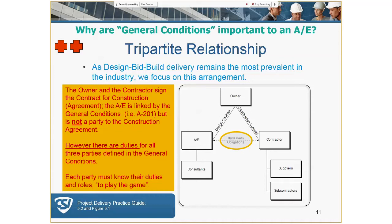We're going to start with the tripartite relationship. The architect and the owner have a contract. It's important to keep in mind that the owner and the contractor have a separate contract, and essentially what the A-201 does is link those two, but they're still two separate documents. That's why it's very important to have coordinated contracts and not to mix and match the contract families — don't use AIA documents with consensus docs or anything else. Use the same family of forms.